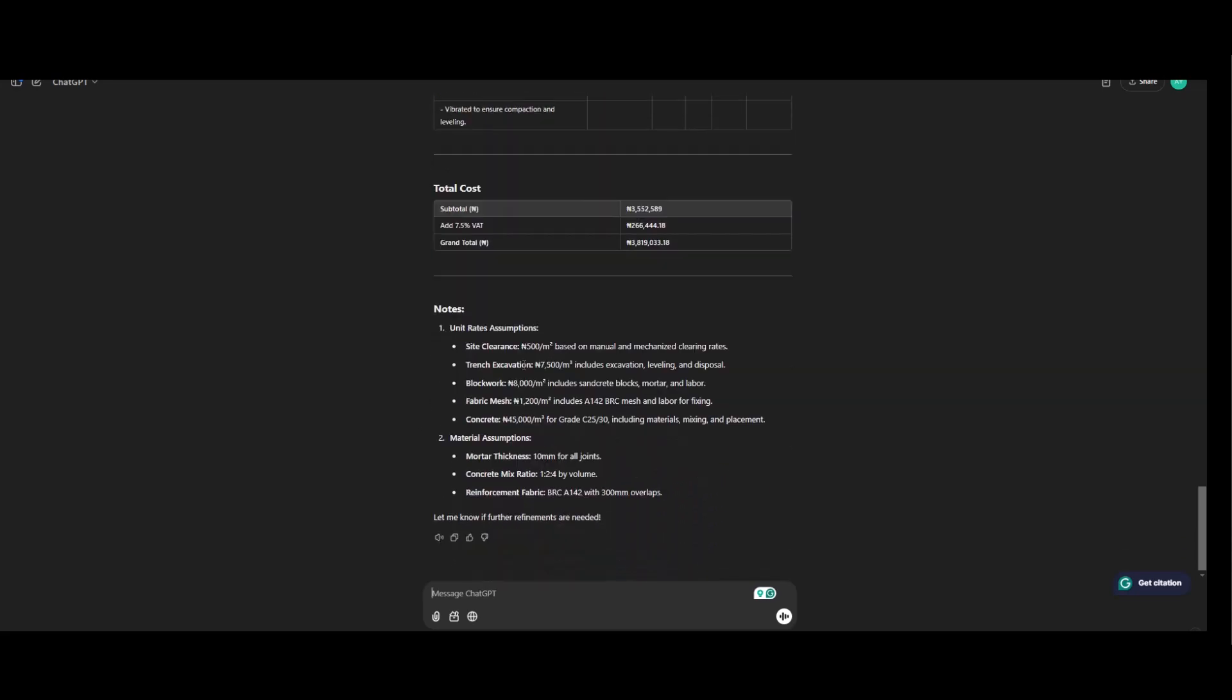Unit rate assumption site clearance. Based on manual and mechanized per mile. Trench excavation. 7,005 per meter cube. Includes excavation, leveling and disposal. Block work. 8,000 per meter square. Includes sand grid block. Mortar and labor.